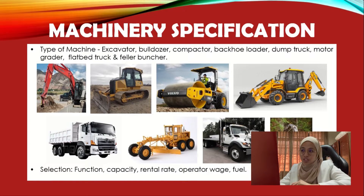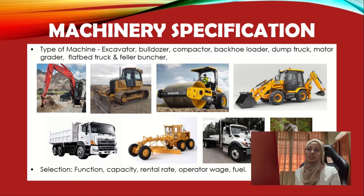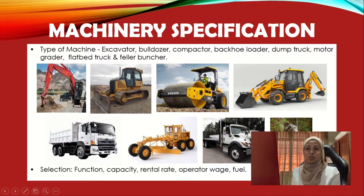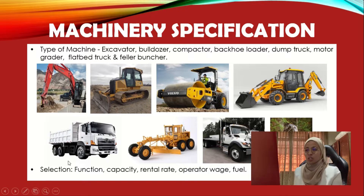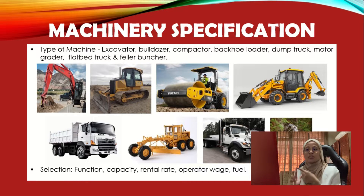For the machinery specification, several types of machines can be used for construction, such as excavator, bulldozer, compactor, backhoe loader, dump truck, motor grader, flatbed truck, and feller buncher. The selection of machinery is based on function, capacity, rental rate, operator wage, and fuel.